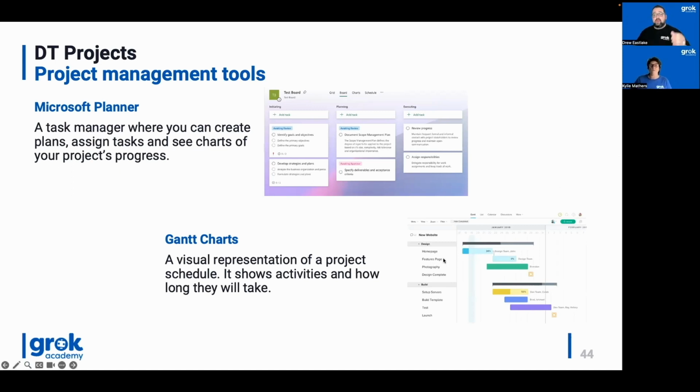That purely just shows, here's a task that I think I'm going to do. Here's how long I think it's going to take, and here's who's going to be doing it. And we might use things like color coding to show how we're going to manage that and who's been given what role and what particular stage of the process it's at. It allows us to see at a snapshot where the team is at working on a project.